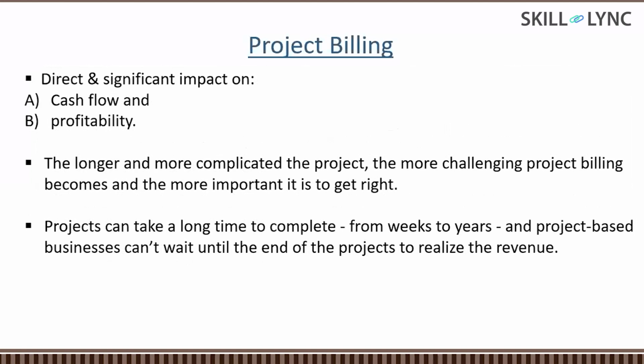But why is it so important? No company wants to invest its own money for a very long time. Let's suppose this 500 crore rupees, even very big companies do not want to invest this money. That is why they want this periodic cycle so that their cash flow will be very good. Suppose they are getting 20 crore from the client and they are spending 15 crore, 20 crore, 25 crore. So nearly whatever they are getting, they are spending. Only then can they sustain and complete the project in a better manner.